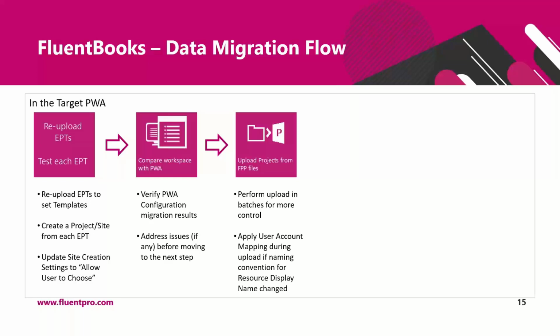In the log file, it will look like a 429 error. This means that there are too many requests to the server, and the server freezes and stops processing those requests for several minutes. To avoid this, you would want to use different user accounts for multi-thread upload.